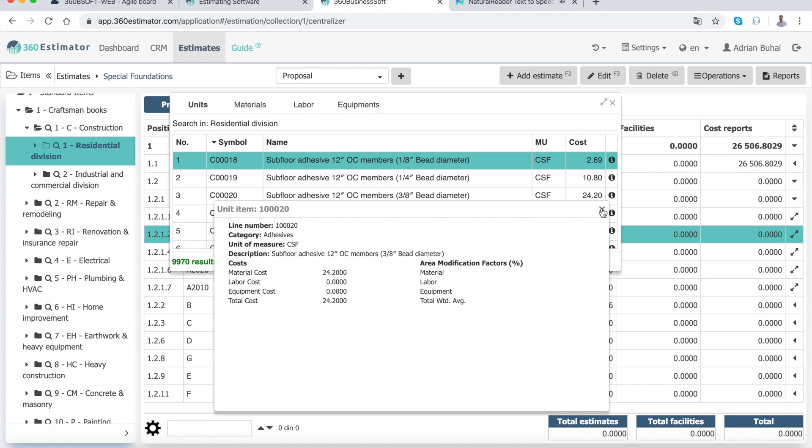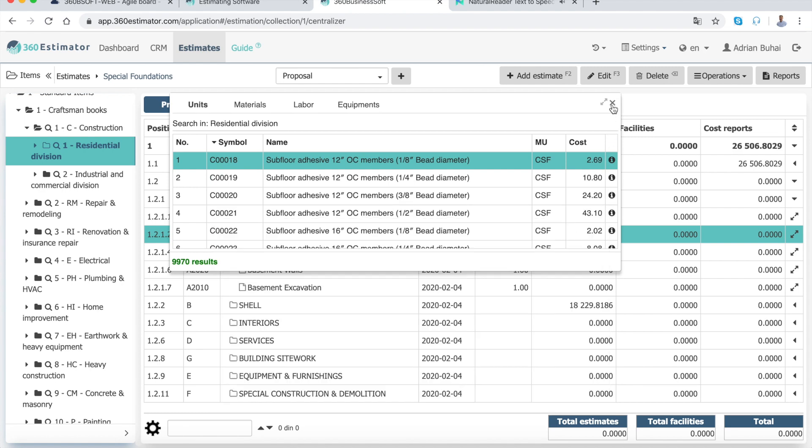Unit items or cost lines are the basic parts of an estimate and represent quantities of various items of work that need to be done. A unit item has a symbol, description, material costs, labor costs, and equipment costs for one unit.